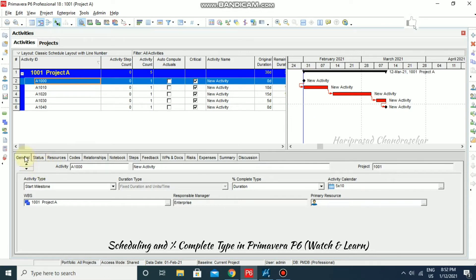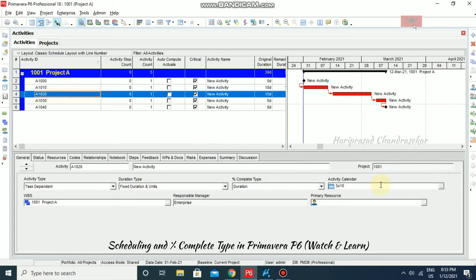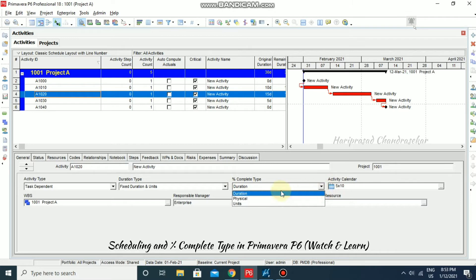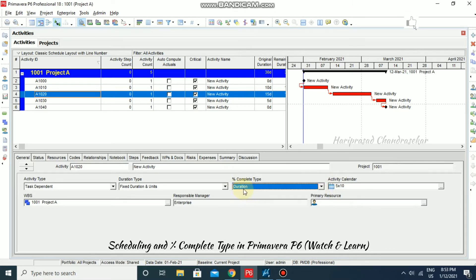Now in the general tab we can see the assigned calendar for all our activities — it is 5×10. If you want to change it you can do so here and see how the duration varies. We also have a percentage completion type with three methods: duration, physical, and units. By default it is duration.